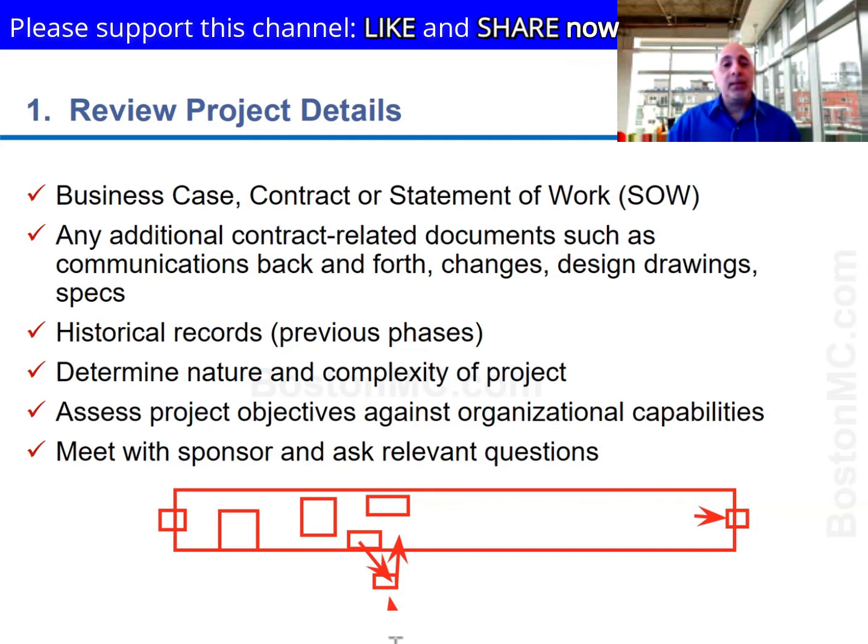Okay? When your management commits publicly and says, we will achieve this by 2022 or 2023 or something like that, the last thing they want is for the statement to become false. And so you always have to warn them: if we are going to do this, it is going to take resources and it's going to distract us from the path that we're working on, which means what you planned for this timeline is not going to happen. Okay? The only way that's going to happen is if you give me more people to work on this so that I can oversee multiple initiatives to help you achieve your vision.